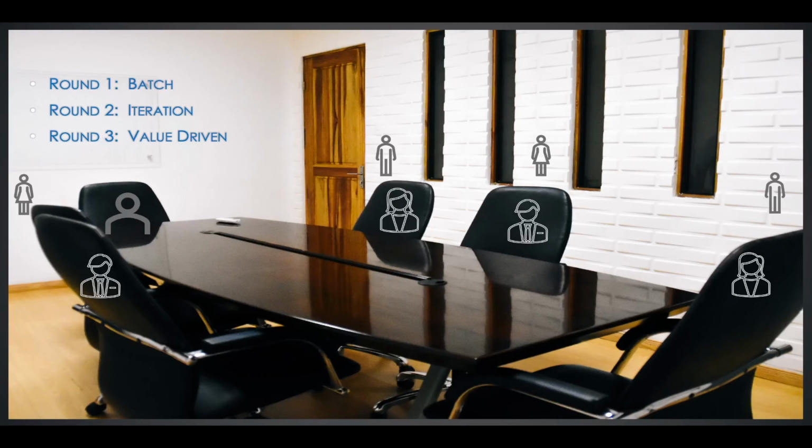Based on observations from rounds 1 and 2, the team must determine how they can self-organize in order to most efficiently deliver value together. Perhaps the teams can change the batch sizes in order to maximize efficiency based on individual players' capabilities, or perhaps new techniques for flipping efficiency were discovered. Once the team has determined their approach, execute the round and observe the impact of the changes.